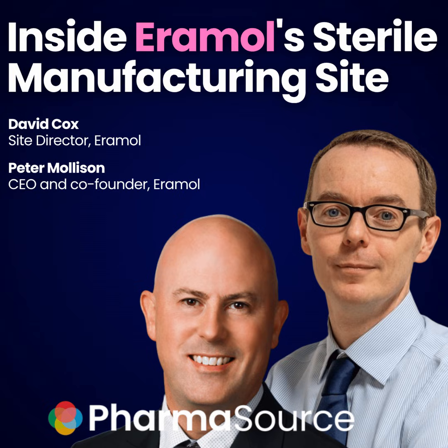I think we've done so many builds in the past, nothing really surprises me too much, but I think the lead times of key equipment still raise eyebrows, especially equipment like what we've used in our isolator. We could have gone with an off-the-shelf isolator with a 4 to 6 month lead time, but we made the choice to go with a semi-bespoke isolator which had a lead time of probably 12 to 15 months. That is the one thing that surprised me.